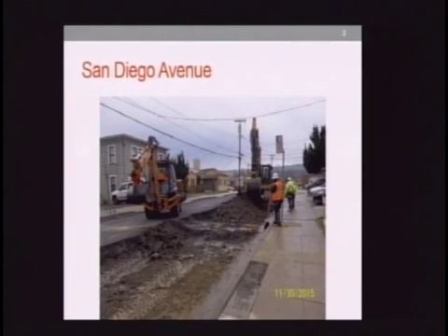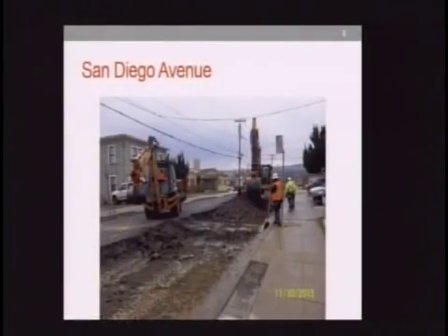Staff discussed the issue with the pavement technical consultant, NCE, formerly known as Nichols Consulting Engineers, to determine the mitigation measure. NCE is the consultant the city has previously used to obtain technical assistance and pavement treatment recommendations for the project. NCE recommended the existing subgrade be excavated, which is shown on the slide, and replaced with more stable aggregate surface, placing dual fabric between existing and new subgrade materials.